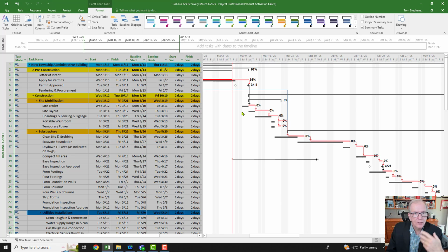If we can't, then we're going to try to get an extension to the contract. We're basically making these adjustments and pivots. Or maybe we're just trying to realign our workforce for all of the schedule changes that we need to adjust as a result and see where things are going and what we can do about it. So the recovery is looking forward, right? And in that case, I just want to look along the critical path. Where can I save time?